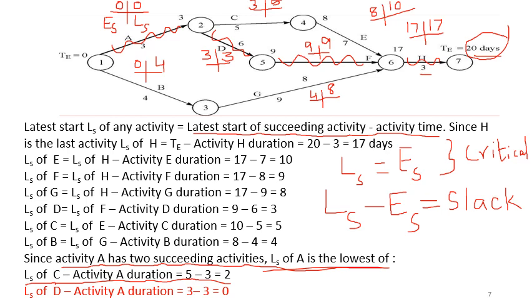If someone says, can I delay activity C by, say, 1 day, the person who is in charge of activity C says, can I take 1 more day for completion of activity C? Immediately check whether activity C is a critical activity or not. If that activity is a critical activity, straight away tell, no, not possible, because it's a critical activity. No delay is permissible. Whereas in this case, it is C which is under consideration. C doesn't fall under the critical path.